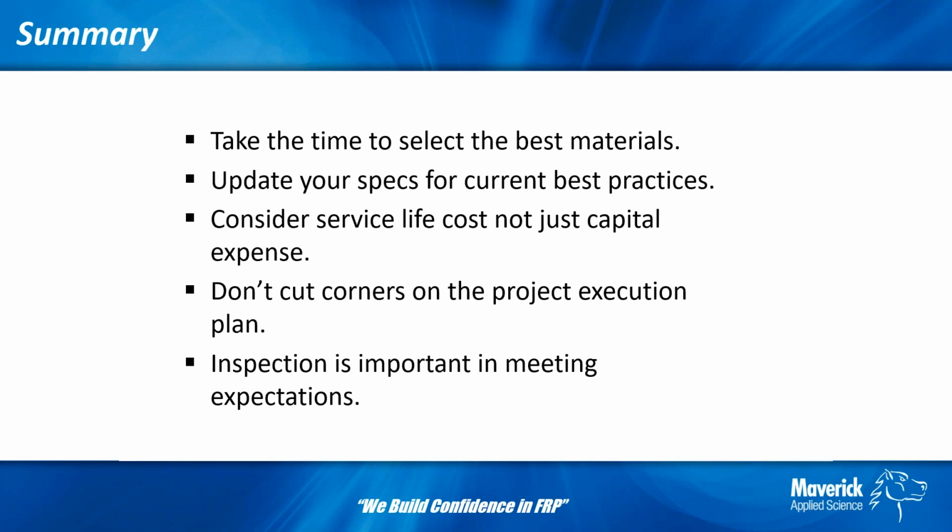So to wrap it all up, I guess my best recommendations are take the time to select the best materials. Obviously, it's always a challenge when you have budgets, but look at service life costs for the full service life, not just the capital expenses, because the cost of replacement and rip out and putting new material in is substantial, and it'll outweigh any savings you have on the capital project side. If you have projects coming up, or even if you're doing repairs just for maintenance, have good specs, have specifications and procedures in place, so that when you have a manufacturer come in, you're defining your expectations and what the current best practices are.